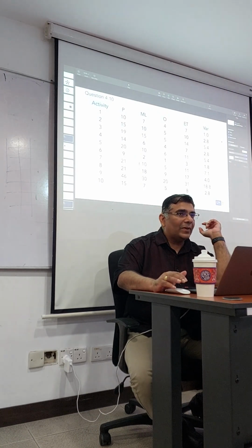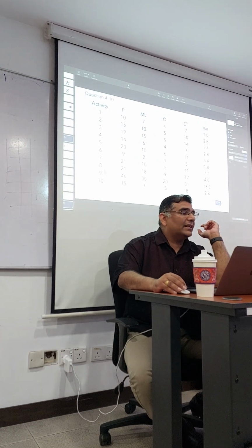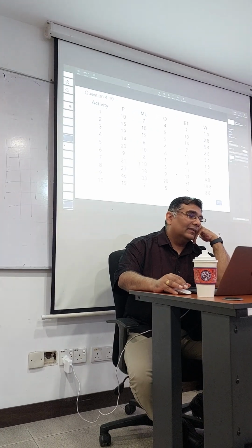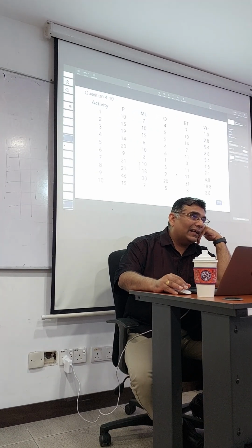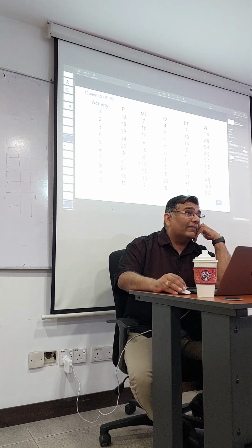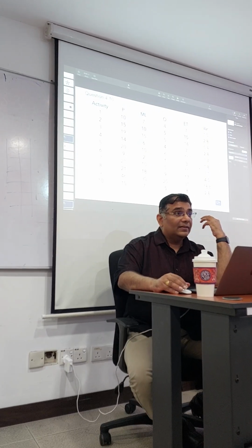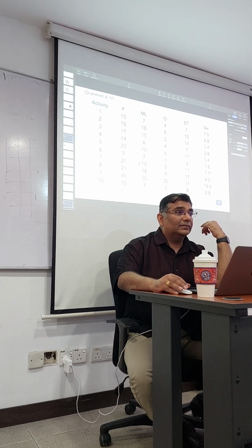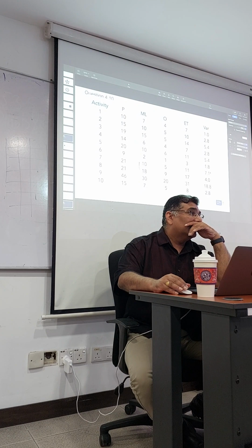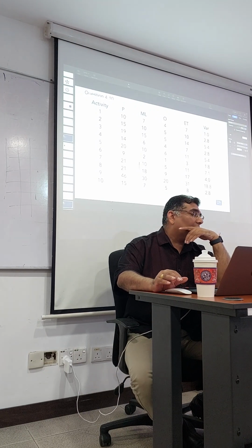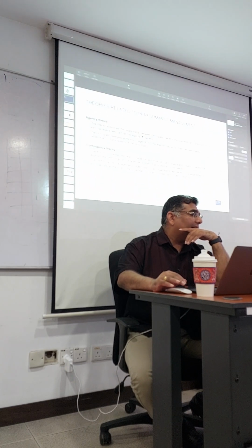Which activity is the riskiest one? 9 is the riskiest one. Second riskiest one? 7. Are you clear now? So you must be able to identify the activities with the highest risk in terms of time by calculating the variance. Are you clear? This one is the highest, second highest, got it? Any questions there? Are you clear on how to calculate this? Yes, no? Okay, let's move on. So we are done with that one.